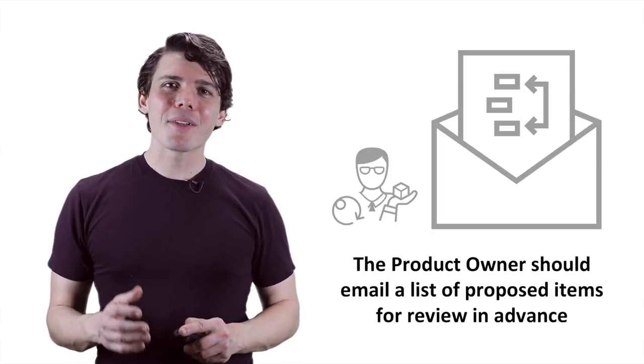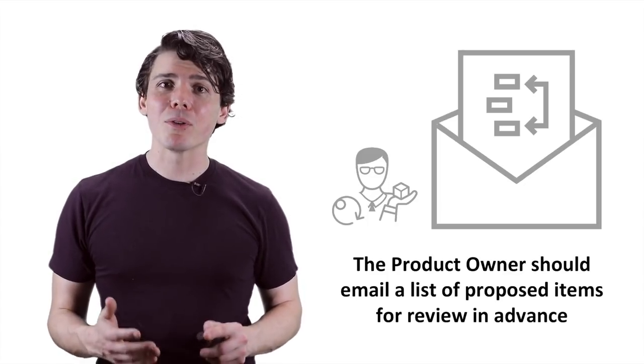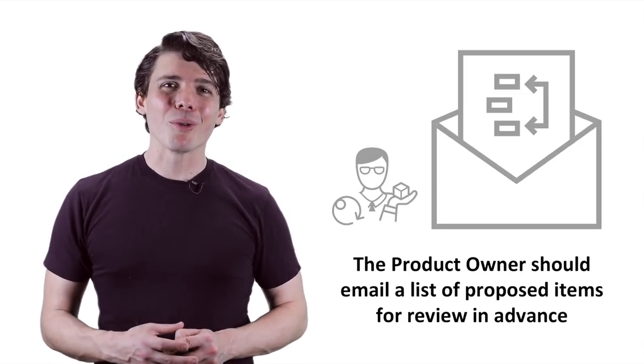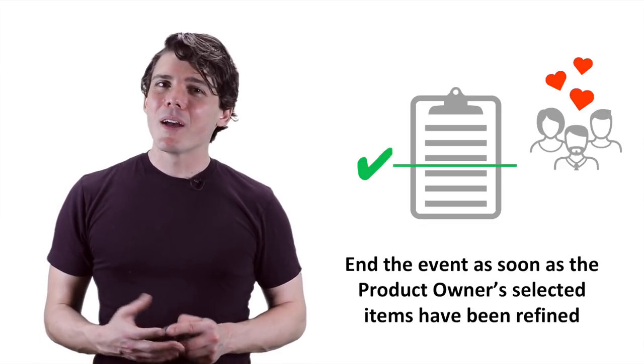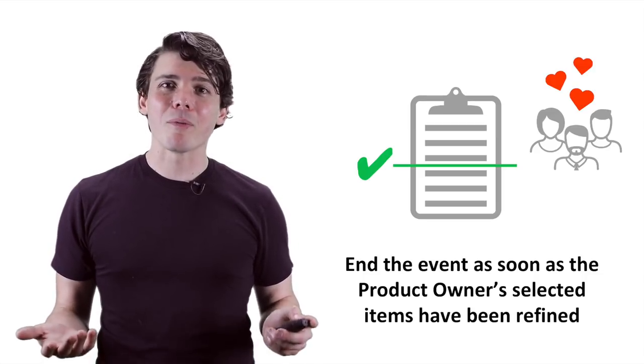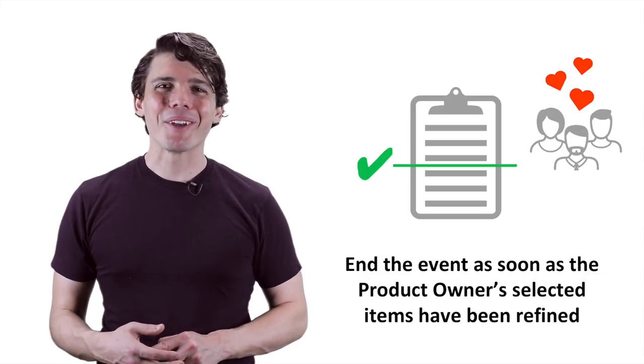Before you start, I suggest having the product owner communicate a proposed list of items for refinement to the team at least a few hours before the event. This gives the team a chance to look at the stories earlier. If the product owner and scrum master are willing to conclude the event when all of these items have been refined, rather than move on to new topics, it can also be highly motivating for the team.